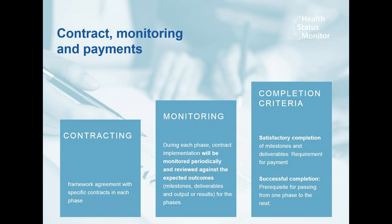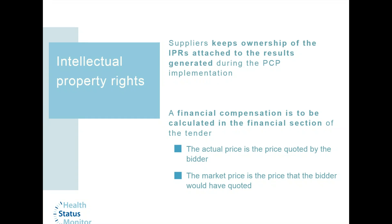We sign a framework agreement and also specific phase contracts in each phase with the awarded suppliers. Contract implementation is monitored periodically and reviewed against expected outcomes, which are milestones, deliverables, outputs, and results for each phase. Satisfactory completion of milestones and deliverables is a requirement for the settlement of payments, and successful completion of a phase is a precondition for passing to the next phase. Regarding intellectual property rights: it is the suppliers who keep ownership of the IPRs attached to the results generated during the PCP implementation. You keep the IPR of your solutions and are free to sell your solution freely in the world markets.